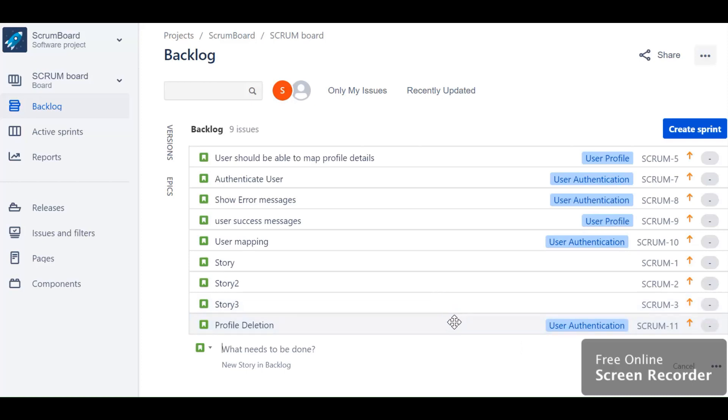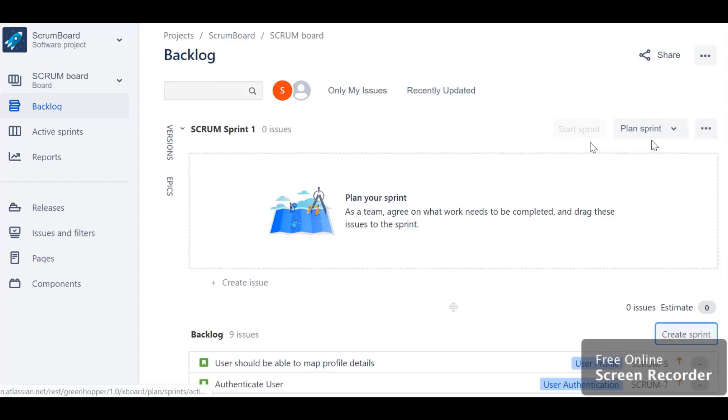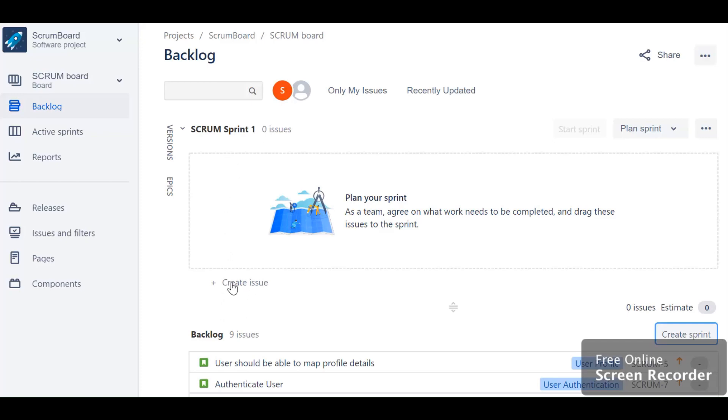Let's see how to create a sprint. In case you are not seeing this create button over here, that means you do not have access rights, so raise a request to your JIRA administrator. Click on the create sprint button. By default, it will use your scrum board and concatenate it with sprint one. Currently there are no issues over here. You can create an issue from this button or pick something from the backlog.